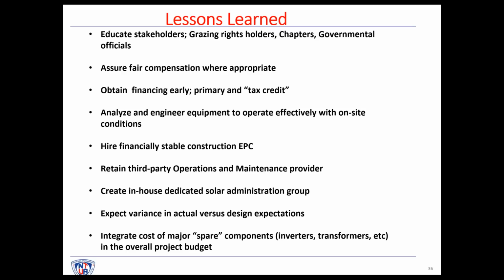Obtain financing early. I mentioned that Kayenta 1 did not include investment tax credits because we were late to the game. We didn't start that piece of the financing early enough, and time ran out on us, and we weren't able to obtain investment tax financing on Kayenta 1. So that's really an important piece, especially if you're going to use investment tax credits.